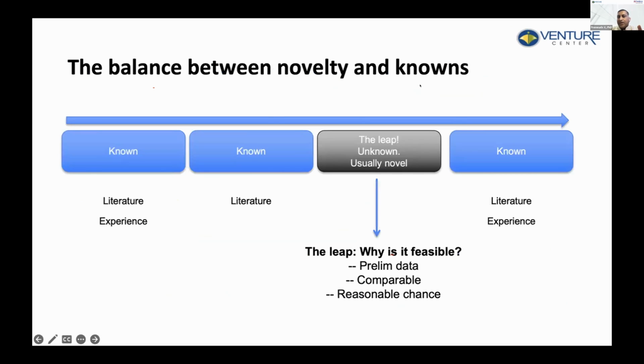Many people worry about novelty and things being known, and we see a few different approaches people take, some not very healthy. One is they tend to say that everything they are doing is new. By the way, this has a big risk: if everything you're doing is new, everything has to be proven, and that requires extra work, right? So it's a good idea to break it down into parts and say, yes, part A, part B, and part D are known, but part C is what I am doing new.